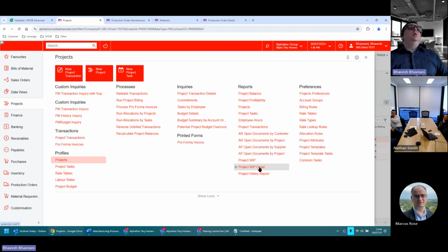That will tell you. The point being is when you finish the base, how does it work now? When you finish the base, someone informs the AR team, okay, it's time to invoice the customer. Correct? Yes. They would generally go to the project and then create the invoice. But here, all they have to do is run the invoice. They don't have to manipulate the project.